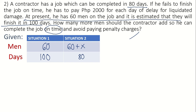Now let's determine the type of proportion. If the number of men working increases, will the number of days to complete the job also increase? The answer is no — because if you have more men working, the number of days to finish will be lesser. The direction is opposite, so the type of proportion is indirect.